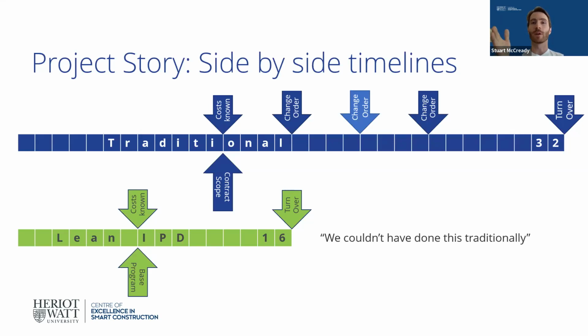And from that point in time, that is your target cost that we're aiming to achieve by the end of the job. And that still includes value engineering opportunities that you work to complete as you finish the detailed design. But during the phase from the beginning, we have our own estimating team on board who develops the estimate as we go. So we tried to do a parametric kind of estimating process, where when we evaluated each of the options, we said, okay, this is the indicative cost, for example, for steel or for a concrete structure. And that is through indicative sketches and things like that. For our project specifically, because it was a low-rise commercial building, this was an easy approach for us. So for initial sketches, indicative steel beam sizes and column sizes, we could do all that on the fly.